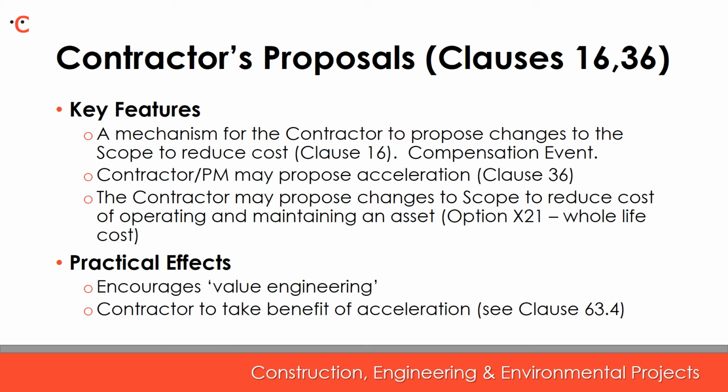If I can then turn to contractors' proposals, clauses 16 and 36. The NEC4 suite of contracts now include processes for contractors to propose changes to the scope of the works to allow for cost reduction opportunities. But both the project manager and the contractor can propose positive changes to improve the project outcome, especially where these arise during the course of the works, which may not have been obvious at the start.